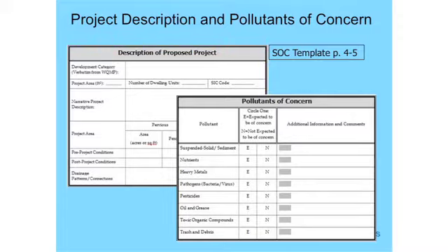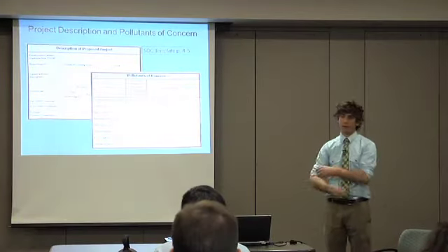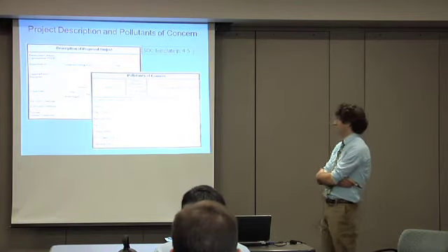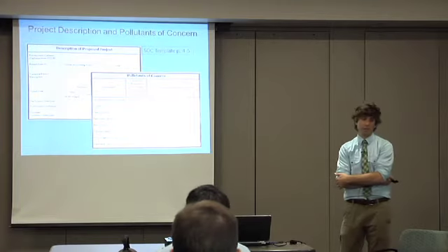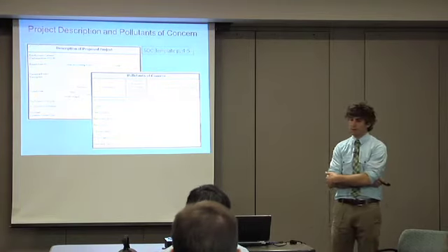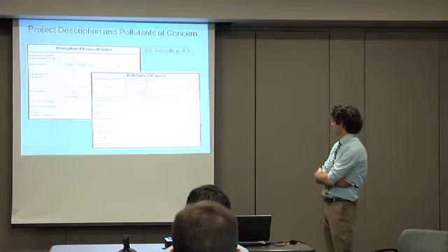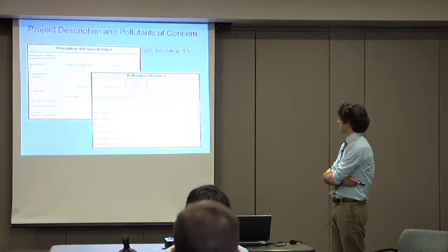The project description can't significantly change relative to water quality characteristics of runoff and expect the same approval of a conceptual WQMP to carry through to grandfathering of their final WQMP. If things do change, that would be reopening and the need to define additional source control BMPs or result in different selection of BMPs to address the pollutants of concern.